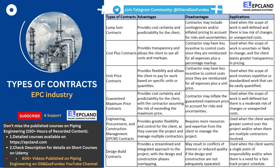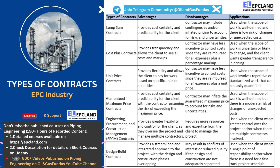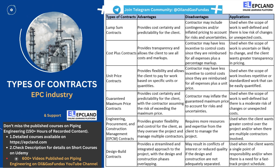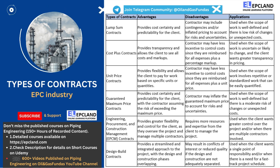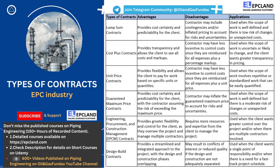However, there are also some potential disadvantages to design-build contracts. Because the design and construction phases overlap, it can result in conflicts of interest or reduced quality if the design and construction are not adequately separated. Additionally, the contractor may have less incentive to control costs since they are responsible for both design and construction and may be motivated to maximize their profits. Overall, design-build contracts are best suited for projects with a need for a fast-track project schedule or when the client wants a single point of responsibility. They can provide a streamlined and integrated approach, potentially resulting in faster completion times and lower costs. However, it is important to ensure that the design and construction are adequately separated and that the contractor has appropriate incentives to control costs and maintain quality. As with any type of contract, it is important to carefully consider the specific terms and conditions of a design-build contract before entering into it.